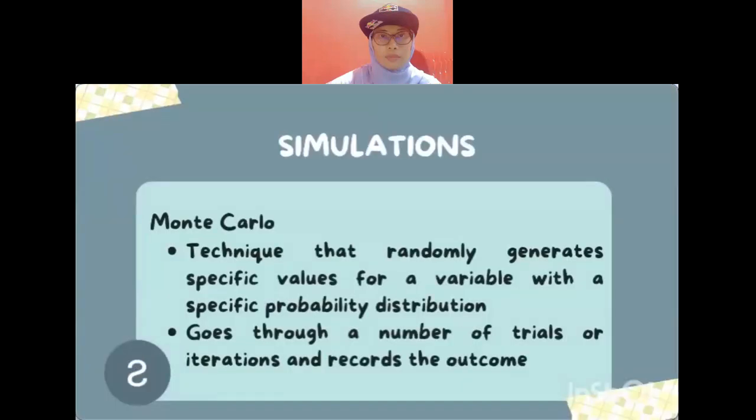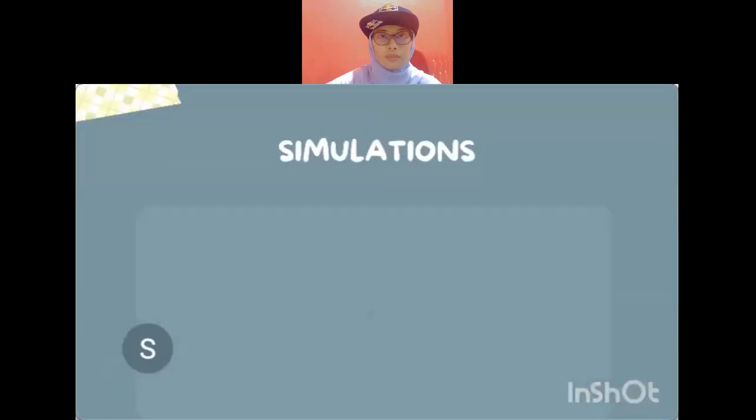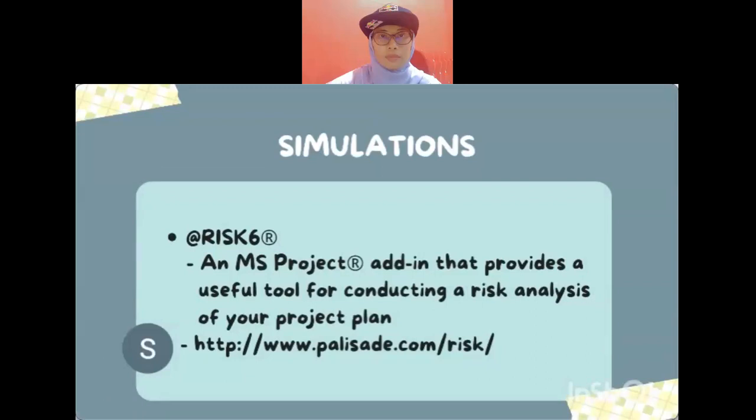In simulation, Monte Carlo is a technique that randomly generates specific values for a variable with a specific probability distribution. It goes through a number of trials or iterations and records the outcome. Next, in risk analysis, a Monte Carlo simulation tool provides a useful way of conducting a risk analysis of your project plan. For more information, please check out this link.